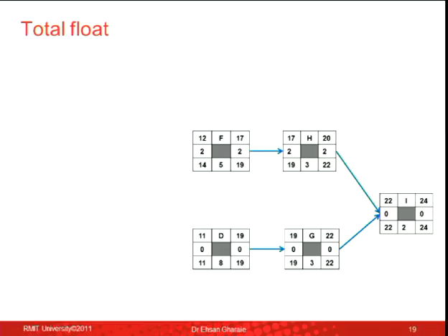So the flexibility that you can delay an activity and it doesn't have an impact on the whole project is called total float. Yes? Can you change the duration, just go a bit slower, like change that 5 to 7? It may happen. So this is your plan, right? In reality, you start implementing the activity, you start on time. But instead of finishing on day 17, you finish on day 18 or 19. Still you can see that there is no impact. Why? Because I've got flexibility at the end of the activity. So I know how much flexibility I've got at the start, and at the end.